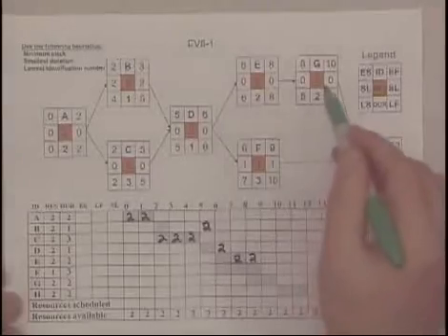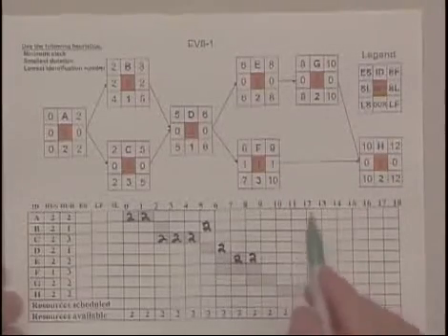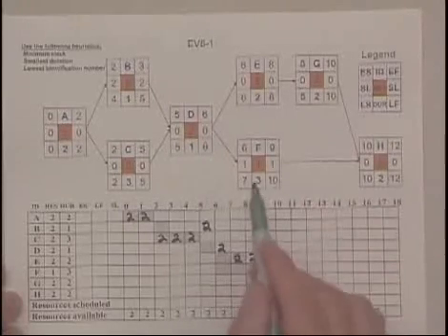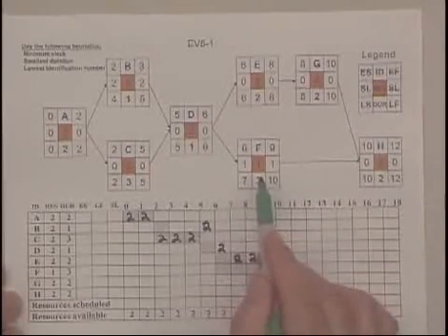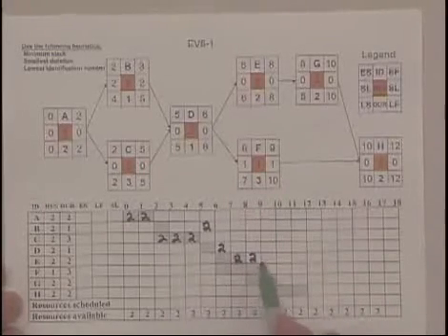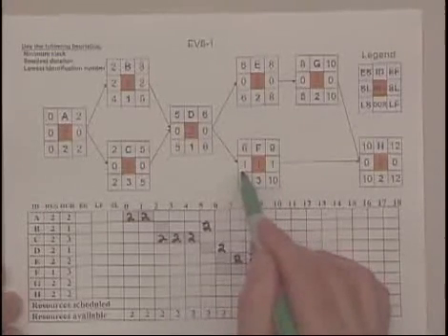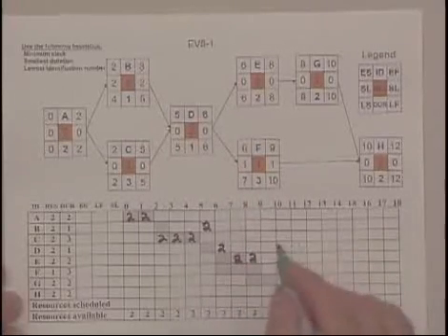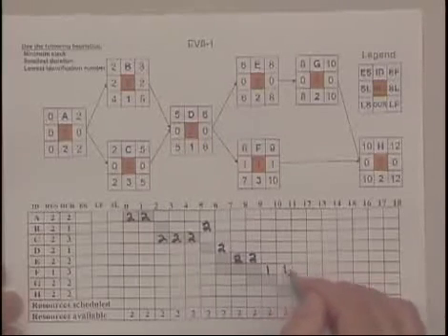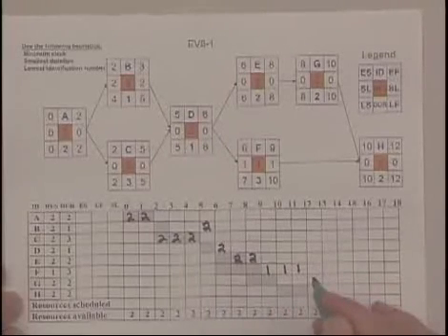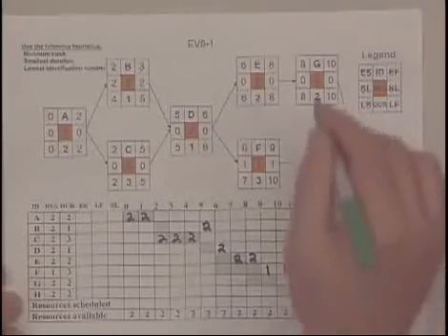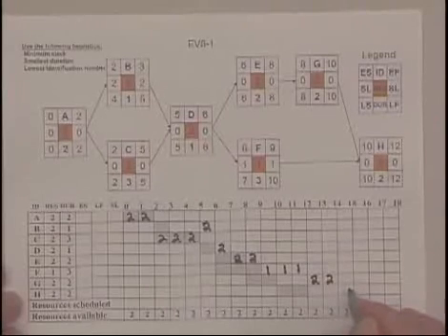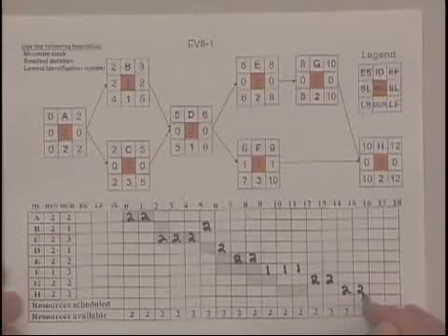Now we have the choice between F and G. And at first glance, we would think we would schedule G since it has 0 slack. But you've got to remember that we've delayed F. We delayed F actually 3 weeks. So it went from having 1 to 0 to negative slack. And so actually it has the least amount of slack, and we would schedule F, which spans 3 weeks. Once F is done, we have the 2 tractors necessary to start G. And then finally, when G is done, we can go ahead and complete H.